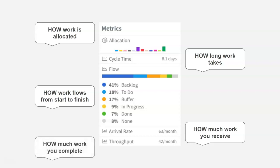And the other one is your throughput, which is to tell you how many cards you're actually completing every month. So this is the ability to show the performance of your team. So this team is able to deliver 42 cards a month or, in average, 10 cards per week.